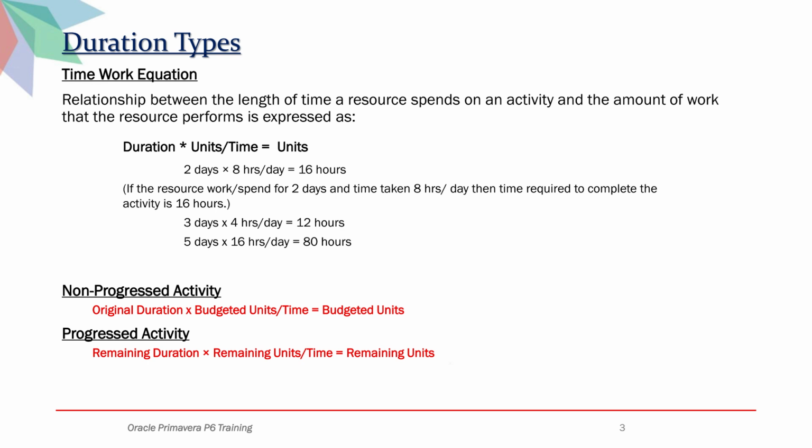Duration times units per time equals units. Note down the example given below and understand clearly. Although this equation looks simple, it is a very powerful concept that will be used extensively throughout this course and in our day-to-day planning activities. In P6, the time-work equation works differently for non-progressed activities and progressed activities.